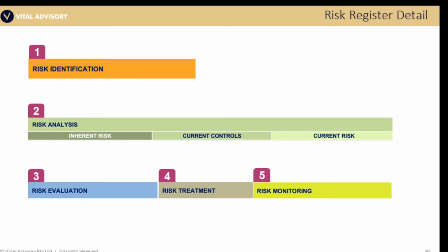You'll notice that in doing that, this becomes a little bit problematic in a spreadsheet, and you probably need something like a risk database, a risk tool, because for each of your risks and each of your current controls, these are many to many. For each risk, you might have many controls. For any one control, it might mitigate many risks. An obvious example being access management is probably going to mitigate a high number of your cybersecurity and InfoSec type risks. Equally so, things like cryptography and incident response as a corrective control.